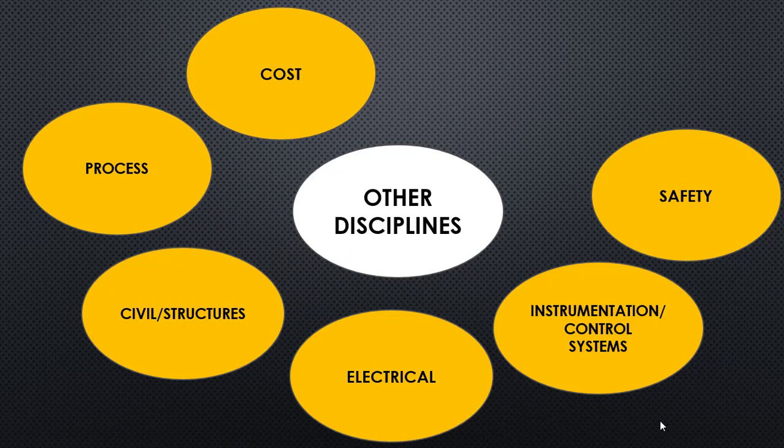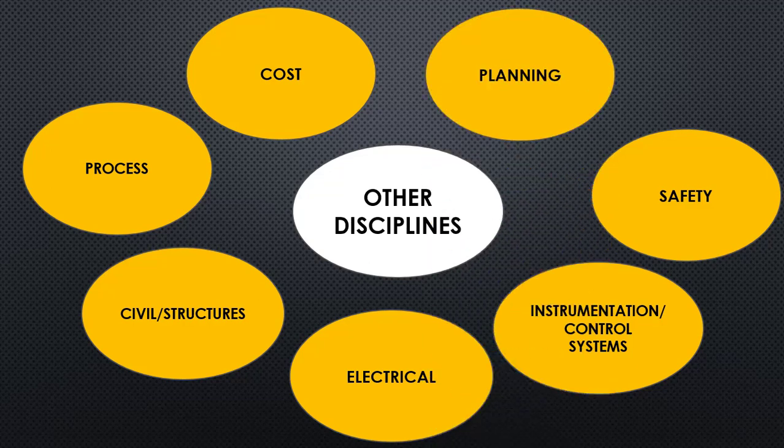The next discipline is cost. A piping design engineer should be aware of the cost implications of the project. The cost or estimation engineer will often ask whether the overall cost of the project can be reduced, so the piping design engineer must understand those requirements and be able to optimize the design to ensure an economical package is delivered. Finally, planning is an important stage. The piping design engineer should know how to plan the entire design phase — how much manpower is required for layout, isometrics, MTO, and other deliverables — so that the planning engineer can develop an overall plan coordinating all disciplines.